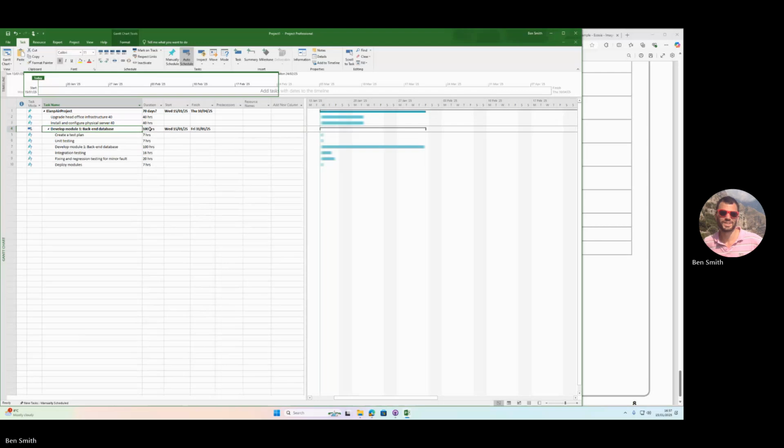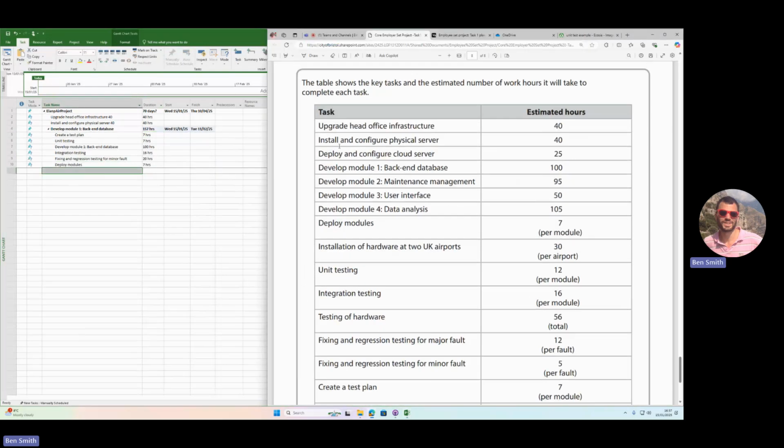And actually the length of that module is all of those hours added up. So that would be 100 plus 16 plus 20 plus 7. So that would be 14, 20, 30, 50, 157. That's how long that little module there will take. So you can include that within the overall project, right? Right, so that's for module 1.